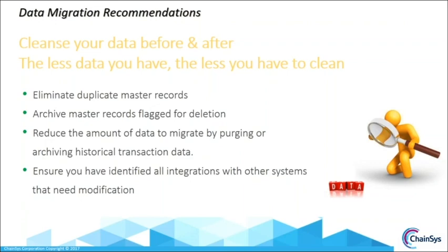You can reduce the amount of data certainly by eliminating duplicate master records, and that may require some standardization to do that. You may want to archive master records that are flagged for deletion. And you may want to reduce the amount of data to migrate by purging or archiving historical transaction data. If you've had data since day one when you installed your ERP system, what's the value to you of bringing over data that's 15 or 20 years old? In the same respect, if you've had customers with whom you have not done business in 10 years, what again is the value of bringing them over? And then finally, you want to ensure that you've identified all of your integrations with other systems that need modification.